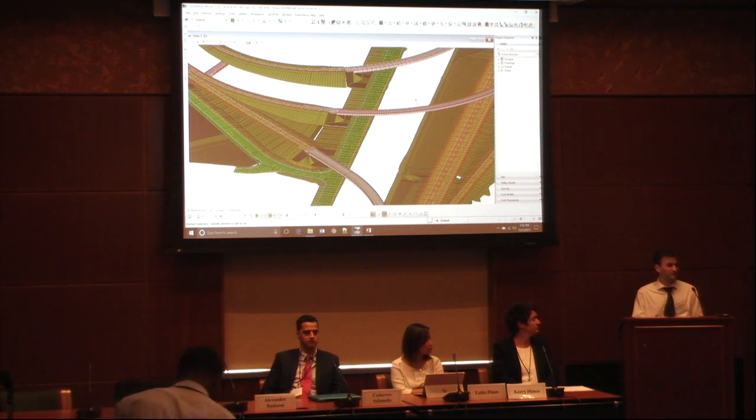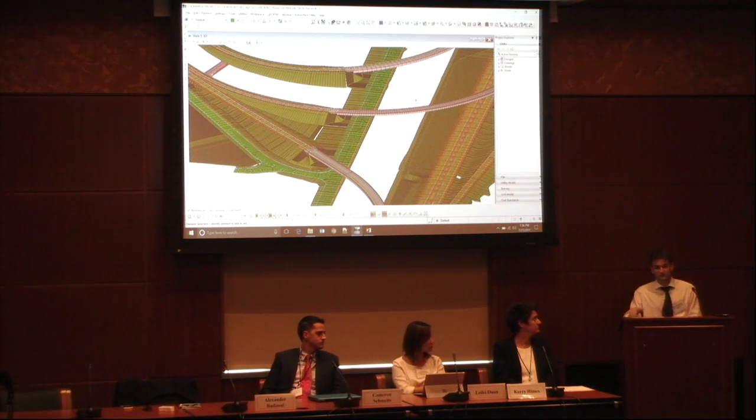I was able to create it within a day because it's from the program. And then those hours became modeling hours. So there's realistic time savings if the initial job is budgeted to do methods the traditional way, and then you do it this way, you'll see the result in saved budget and hours. But no, I wouldn't say a formal university study has proven it with two projects in parallel, one doing things the old-fashioned way and one doing things the new way.